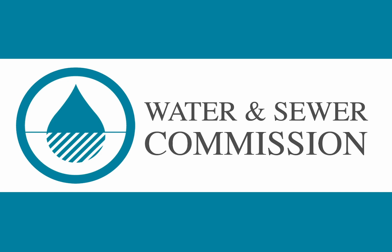We have a line crew for emergency purposes to pay for that. That's about $1,800. I'm waiting for an official quote. I can keep you posted on that. The thought process would be we would have the electrical sub-bidder complete all the work as much as possible prior to taking that station offline. Have a line crew scheduled for the same day that we'd have the electrical inspector scheduled for, say, the afternoon.